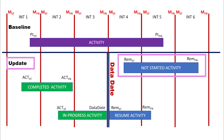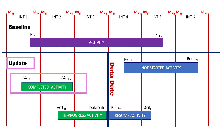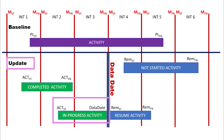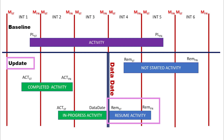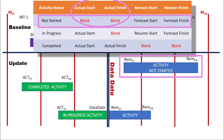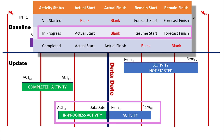Some activities are not started and their dates are after the data date. Some activities have been completed and their actual dates are before the data date. Other activities are in progress, crossing the data date — the part before the data date has started and the other part has a resume date after the data date. To summarize by status: not started activities have blank actual start and finish, with remain start and remain finish as forecasted dates. In-progress activities have an actual start value, blank actual finish, remain start as the forecasted resume date, and remain finish as the forecasted finish date.